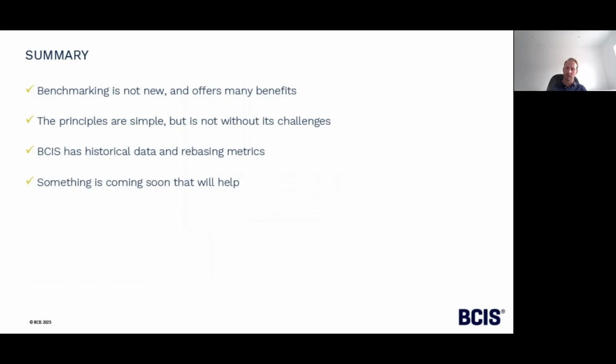It's always good to have as much information as possible to set that number, because that number is the one that people inevitably remember, and particularly on high profile projects, if it sets off on the wrong foot, it's very difficult to recover. And then all that happens is projects get de-scoped, benefits aren't realized in the way that they were intended to, and it all ends up in a bit of a mess.